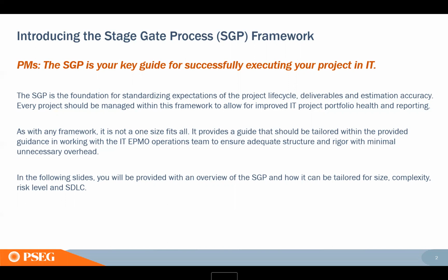Going forward, you're going to start to see a lot of compliance reporting around this. This was something we had targeted for 2021. It didn't really get rolled out due to some limitations with resources on teams, but coming into 2022, I know there's going to be a heavy push to make sure projects are following this, that they have gates, target gate dates, and that they're keeping those dates and flowing through their project per that plan. It'll also be built, like I said, into your schedules in P6. And just so you know, there will be reporting coming out of P6 that helps us appreciate where each project is in this life cycle.